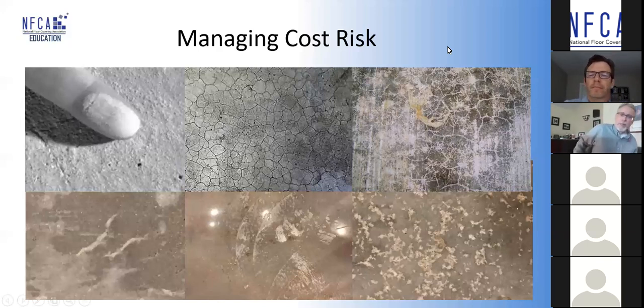So all these things can break down the surface. So you need a cash allowance for adjustment of the surface as well. By the way, excessive latence, like what you're seeing in a lot of these shots, is actually considered a construction deficiency and not a floor preparation requirement.